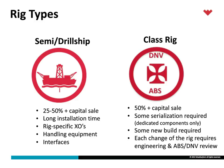Some equipment needs dedicated serial numbers, either dedicated to the rig or maybe shared between rigs. If you went all the way and fully surveyed brand new equipment, it's possible to get a product certificate from DNV where it could go to any DNV rig without being re-looked at. But these things require new build, brand new equipment. Being that Weatherford is in the rental equipment business, that's not always going to be possible. We're going to try to rent where possible, but if the client demands DNV requirements, we're going to have to either sell them equipment or figure out a way to split the capital sale and rental so that the rig has everything it needs to be approved with a minimal outlay of funds.